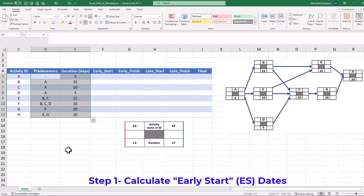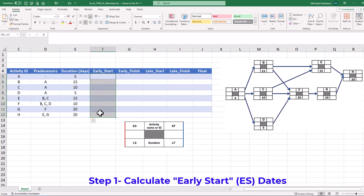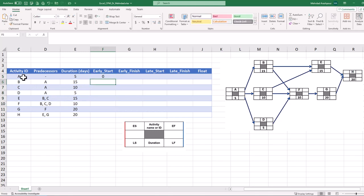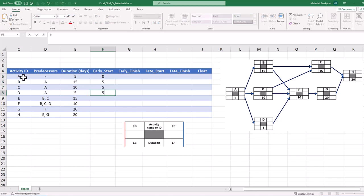Step 1 is to calculate the early start date of each activity based on the project network logic. In this example, we start with activity A, which is the first project activity with an early start on day 0. We can record these early start dates in our Excel workbook. A duration of 5 days for activity A suggests an early start date of 5 for activities B, C and D.